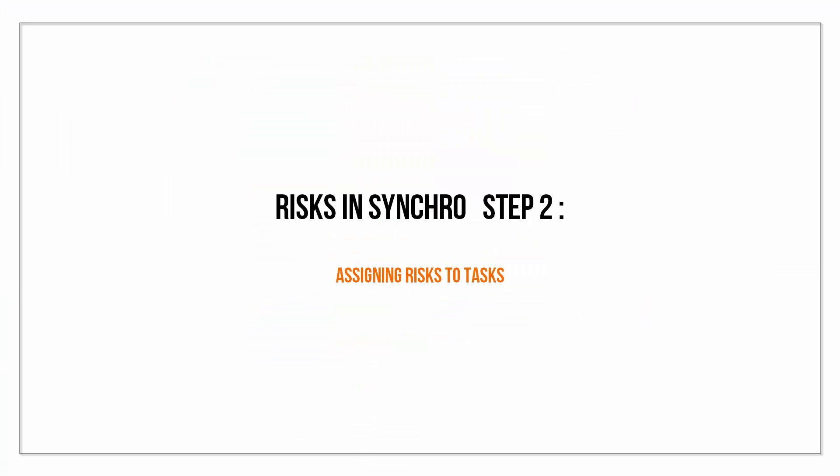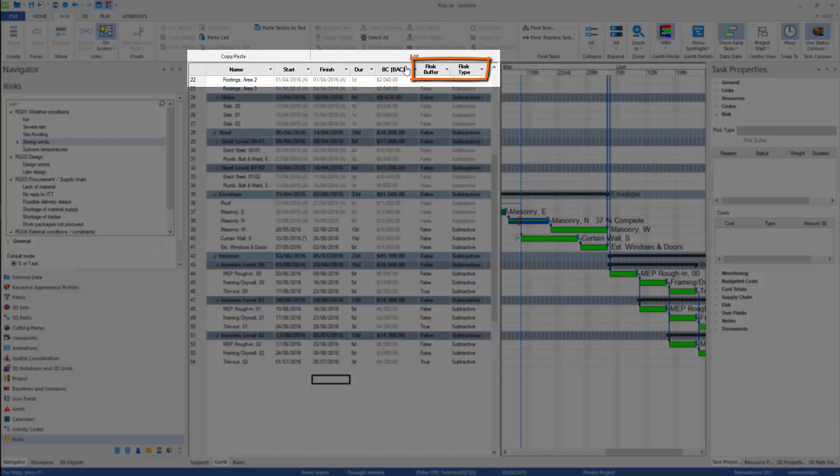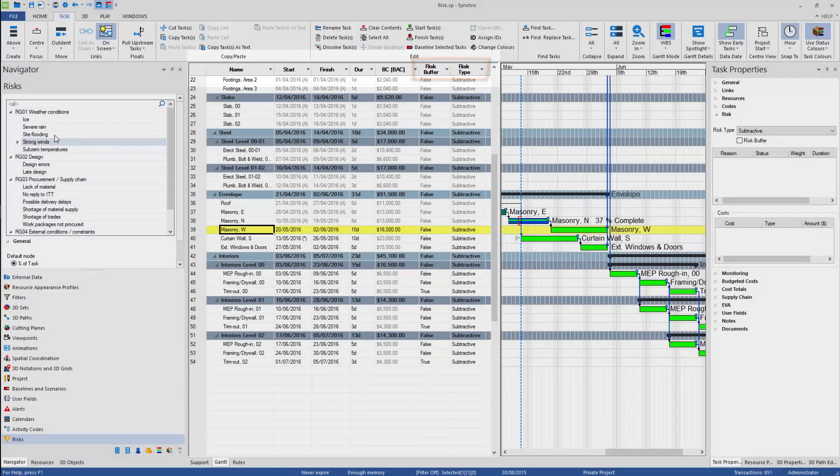I will show how to assign identified risk to task. I've added two additional columns in task view to see which task is the risk buffer and to check the risk type for each task.